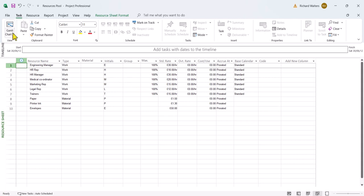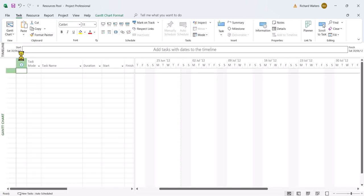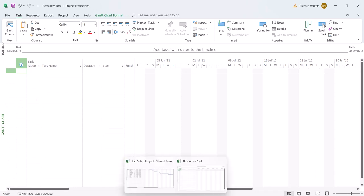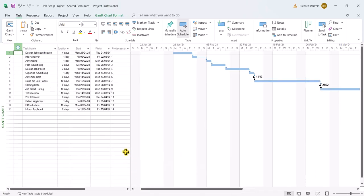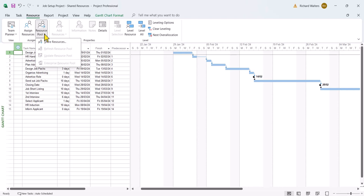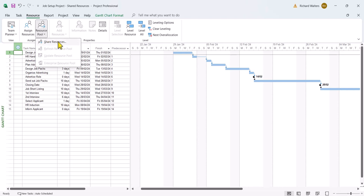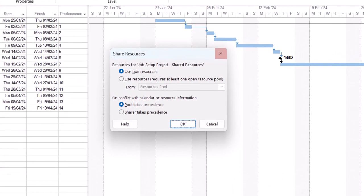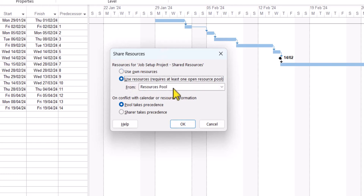I'm going to change this back to Gantt chart as well, and I'm going to use the project which needs resources, which is the original one called Job Setup Project Shared Resources. I'm going to go to the resource tab, resource pool, and share resources. The resource pool has to be open — the file that has resources has to be open to share resources. So I'm going to say 'Use Resources' and this is from the file called Resource Pool.